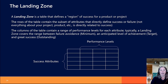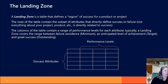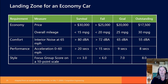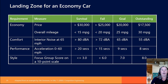There shouldn't be 50 of these. A lot of Eric's work on giant projects really came down to about a dozen key attributes that define success. So what does a landing zone look like? It's a table with a region of success. The rows talk about those attributes — what defines success or failure for the project. The columns are typically minimum, target, and outstanding for each attribute. Here, for example, we have a landing zone for an economy car, and we're thinking about economy — price and mileage.